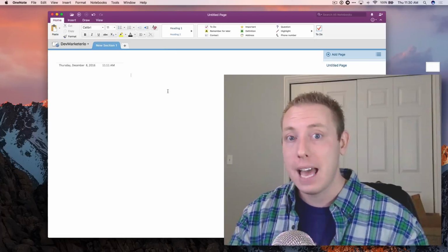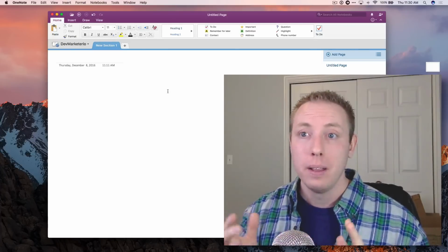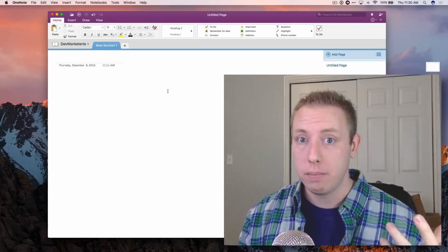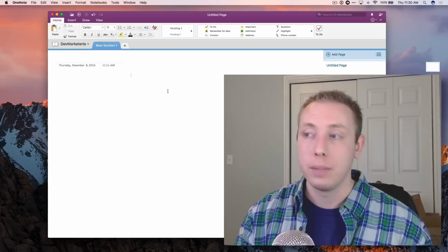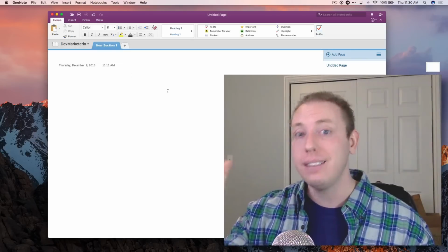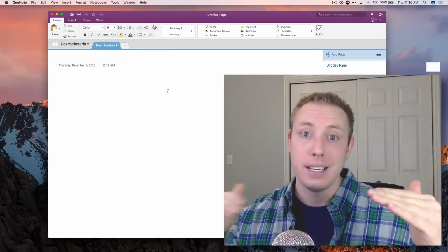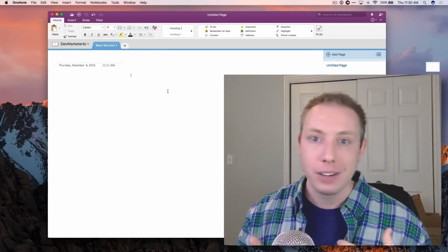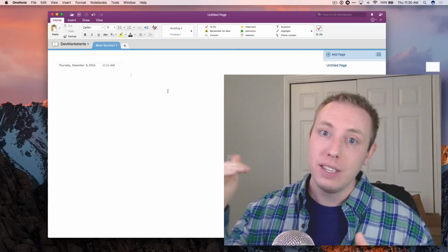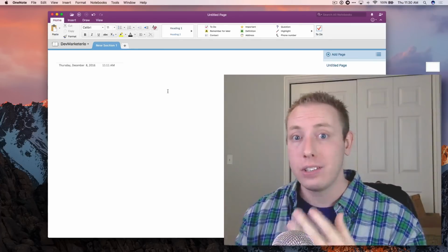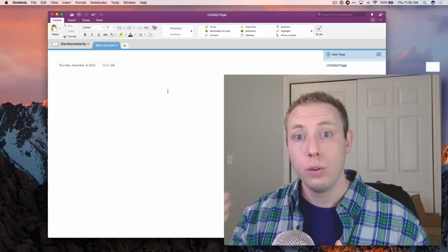And then after we get the idea dump out, usually I'll meet with a smaller team, maybe just the head of the project or a development team, or maybe a couple heads of different departments, and or the C-level board or something like that. We'll meet with them, and then I'll go through and say, hey, if we do this idea, we can't also do this idea. They're conflicting. You can only do one or the other, for a technical reason or something. I can do this idea, but just FYI, this is going to be an extra 100 hours of work. Do you guys still want that? And so then I'll go through and do that phase.